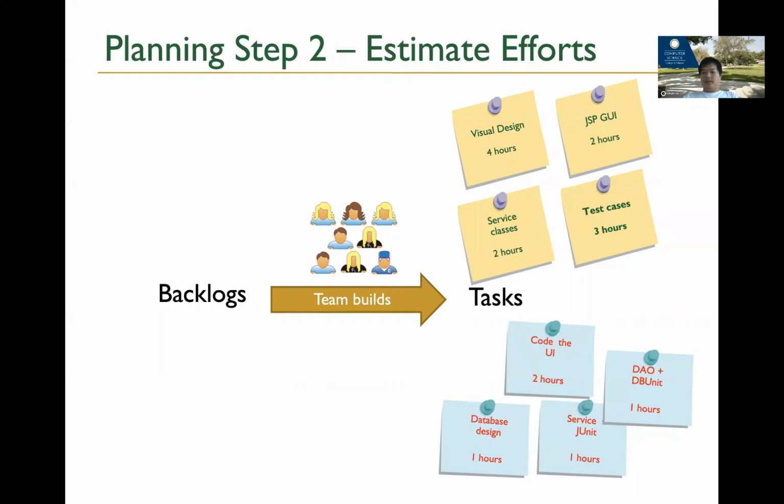But the very formal way is, first of all, we prioritize the list of tasks, and secondly, we make an agreement on the number of hours. This shouldn't be based on the experience. Of course that requires your team to have a decent level of development skills. Sometimes if it's an intern, maybe it's not really counted. Interns normally have different tasks, maybe more independent. They're not going to join in this kind of feature-based, hour-based task. But the best practice is we get these numbers first without considering who's going to work on it, and then we assign it to people.